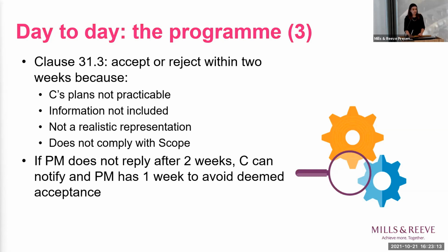New to NEC4 is that if the project manager doesn't reply after 2 weeks, the contractor can tell the project manager, and the project manager has to reply within 1 week. If he does not, then the programme is deemed accepted, so that will be taken to be the right position.